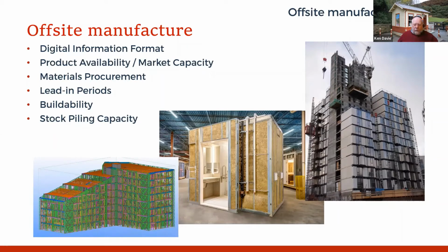When it comes to OSM, the lead-in periods are different. I've mentioned design freeze previously. Again, a lot of OSM is driven by a very early design freeze. It could well be a prescriptive specification rather than a descriptive and finite specification, such that the manufacturers and suppliers can have some input and provide their knowledge and expertise as part of a collaborative process.